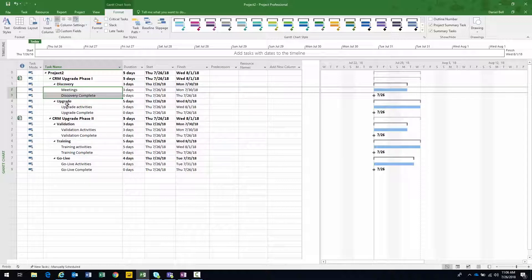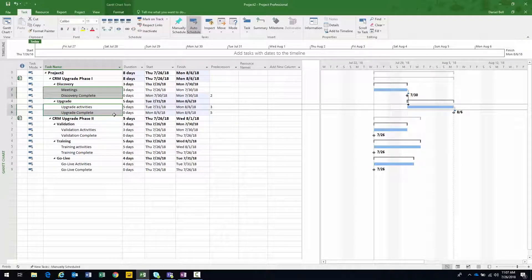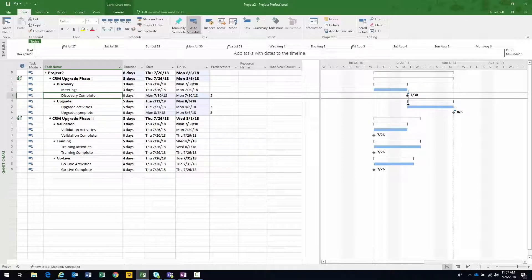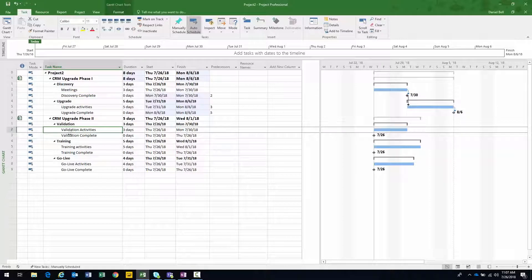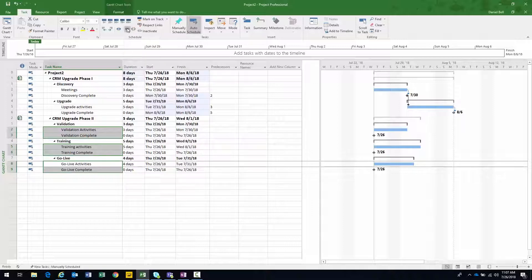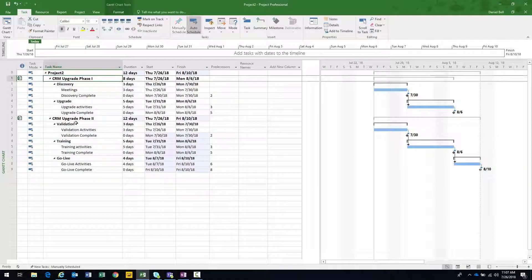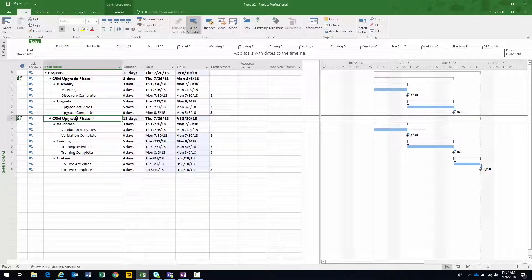We have discovery, upgrade, validation, training, and then finally go live — a very simple project plan. Let's go ahead and create these relationships, all finish-to-start. Then what I'm going to do is create the relationships within phase two. I held down the control key and continuously selected the items. I could have done this in the projects while they were individually open, of course. So now we have the relationships created within the individual projects — CRM upgrade phase one and CRM upgrade phase two. Now let's create the relationship between the two projects.